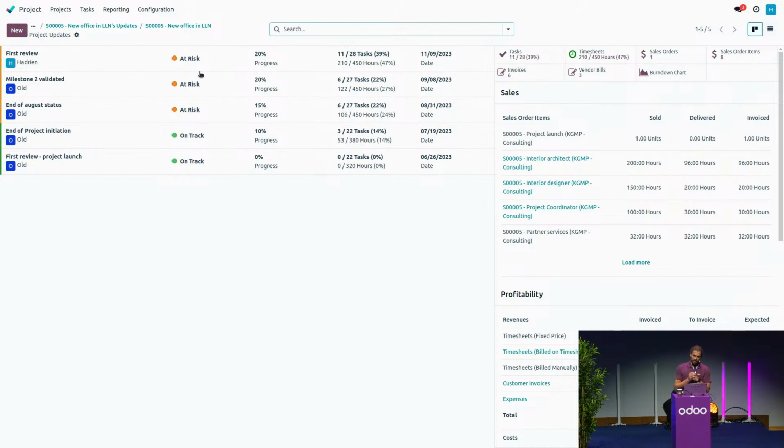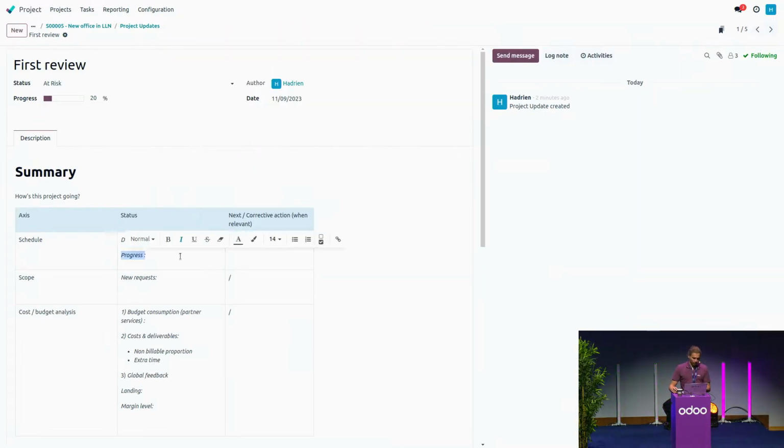There are different ways. In this case, I will do what I think is interesting, which is have a look at how much time we have consumed in how long. This project started end of June, so in 4 full months, we actually did almost half of the project. Based on the fact that we only have 1.5 months, it's going to be a bit short. So I'm also stating here, very easy, 4 months to do 40% of the project.